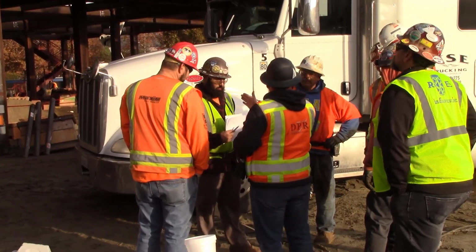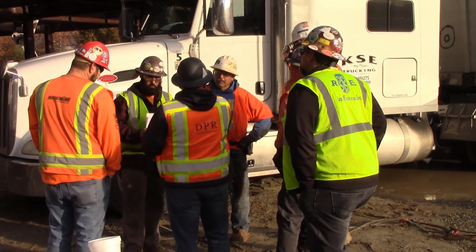During our pre-construction meeting, the goal is to have all that safety documentation uploaded already. So my goal is to review it, approve it, and if there are any questions, we talk about it at the pre-construction meeting. Fill it out first thing in the morning and just upload it right onto HammerTech, and it's done. And then I don't have to spend the time to send myself or an apprentice to DPR's trailer and walk across the job. Same thing with the pre-tasks. They know I need them to upload them into HammerTech, so it keeps my guys in the field honest with doing them every day.